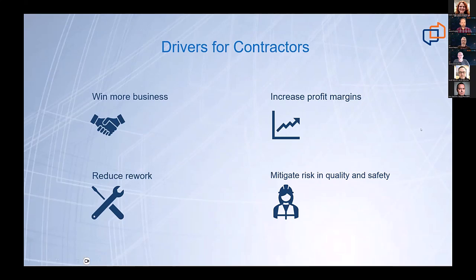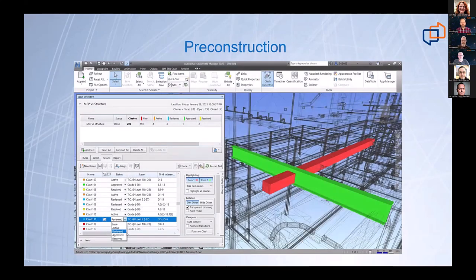building. So in terms of what they're using the model for, pre-construction, obviously, this is what sold BIM to a lot of organizations in the beginning. Clash detection, you can build the building virtually before you break ground, before you spend any money. There's been talk, and I've seen a chart floating around about the exponential increase of design changes as you go down design to pre-con to construction to handover. So the earlier they can catch these issues in design ahead of time, obviously, the more money they're going to save and the better it's going to be for everybody.